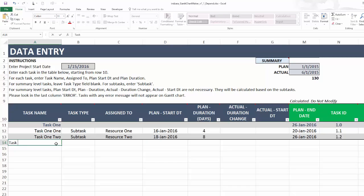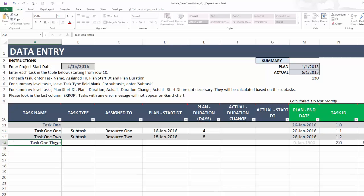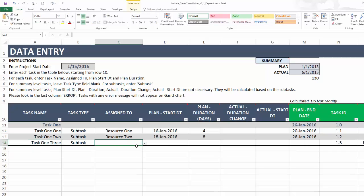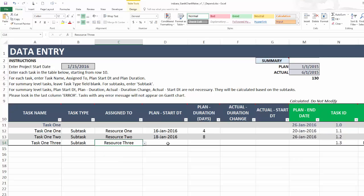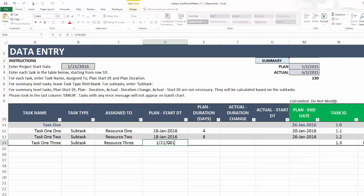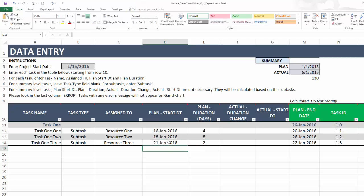Now one more. I'm going to type in task 1.3 and this is also a subtask and this one I'm going to assign to resource 3 and this one let's say starts on January 21st and it goes for two days. So now we have entered three tasks within one summary task and this is great. We have put some durations in there.